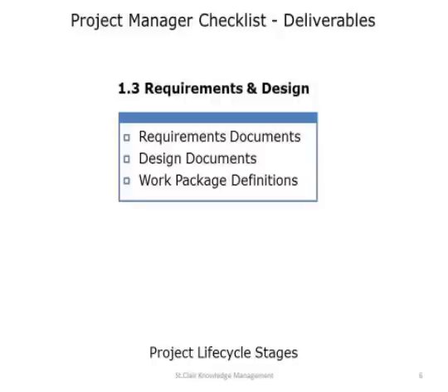Okay, so if, for instance, our project was to build a house, then you'll have a work package for, say, making the doors. You may have a work package for electricals. You might have a work package for the central heating, a work package for the painting, a work package for the roof. So you're really just breaking up the design into manageable and discrete bits of work.